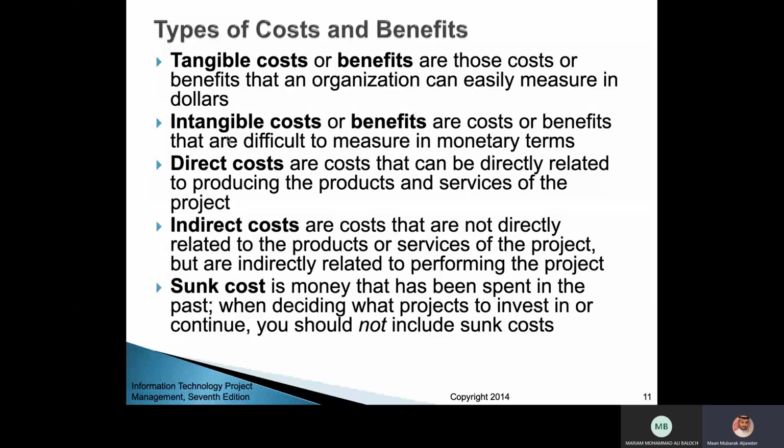It's just a cost that you spend from your organization's budget. If you decided to go for the project after this feasibility study, still you're not going to include it in the budget of the project, because the budget will start later. When you start the project, it will have its own budget. So you don't put these costs with the budget of the project.